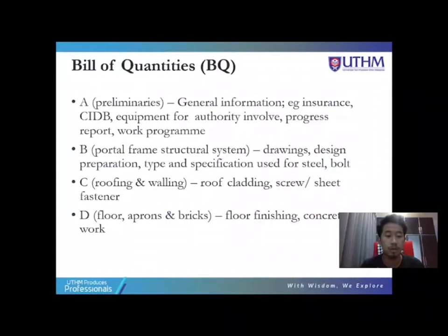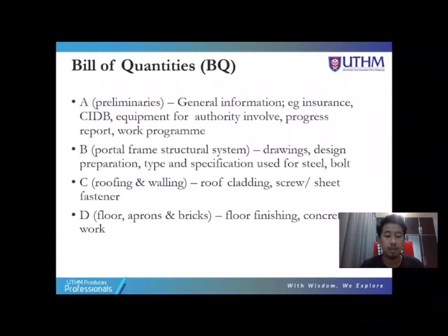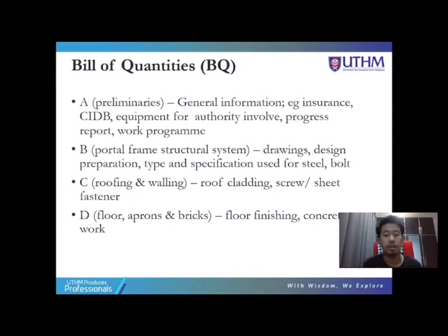Section B is the portal frame structural system. The contractor has to prepare the drawings and design, which must be endorsed by the PE. Section C is roofing and walling, which contains roofing, roofing cladding, screw sheets and fasteners.